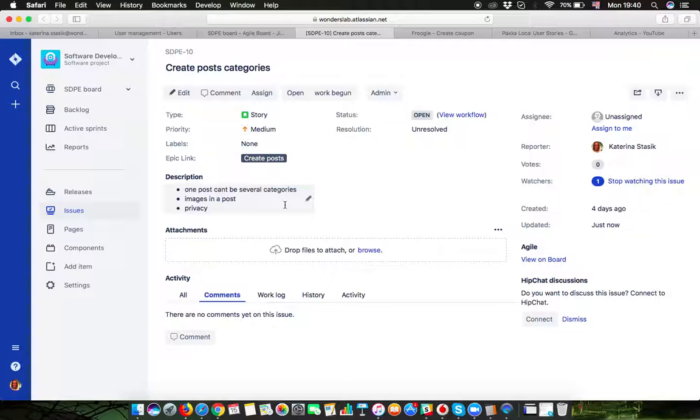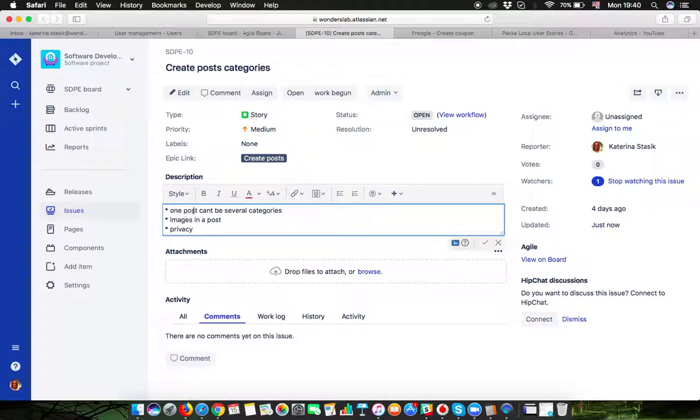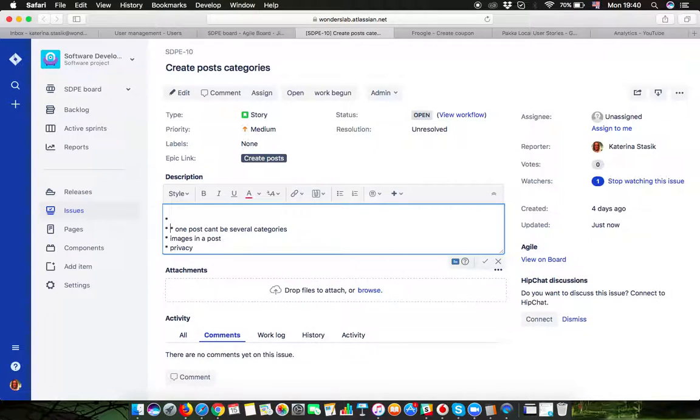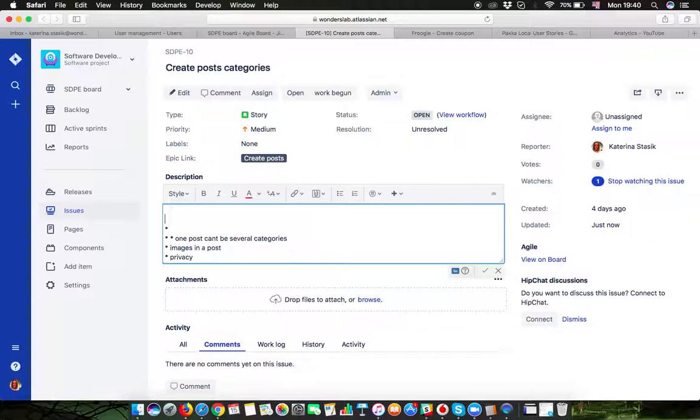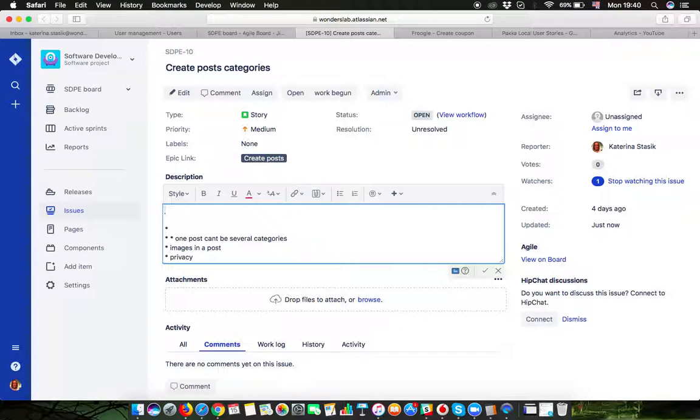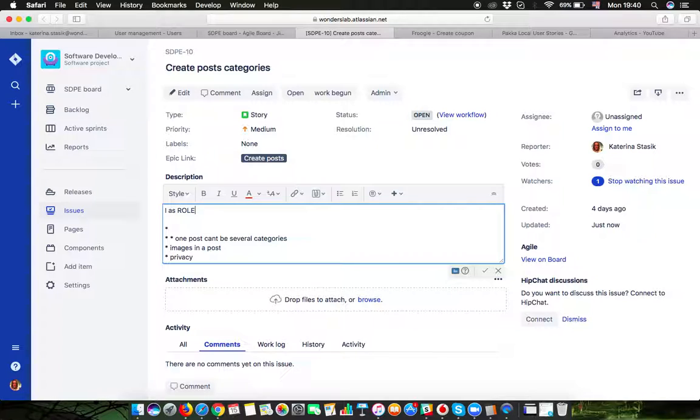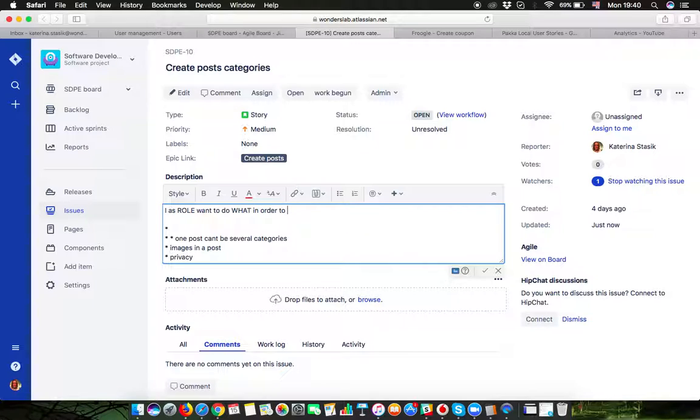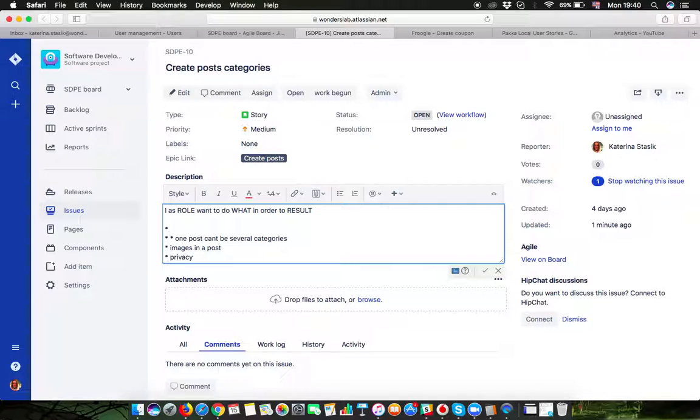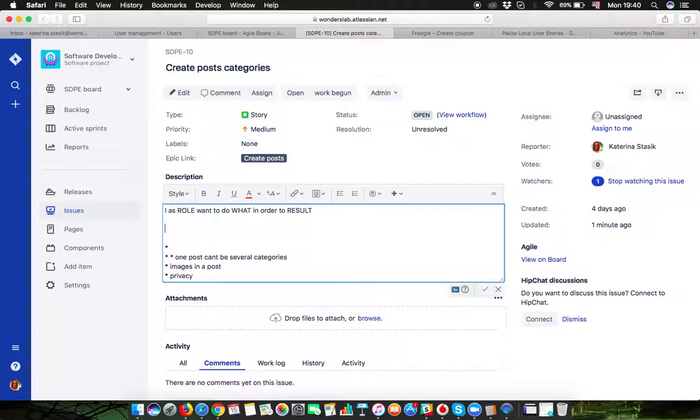I will look at the sketches of the ideas I left for myself and now say I'm ready to create a story. A properly created story should contain a persona or role who's gonna be using the functionality, what you want to do, and the result, the expected result of the action. So it's gonna be like: I as a role want to do what in order to result.